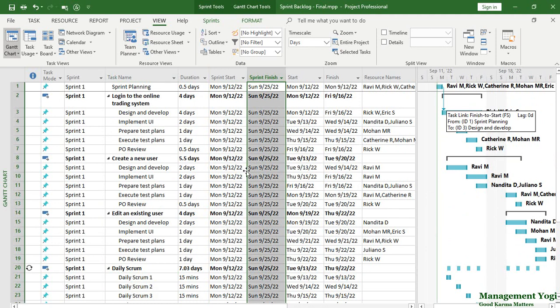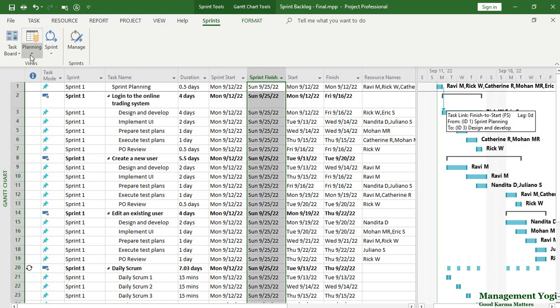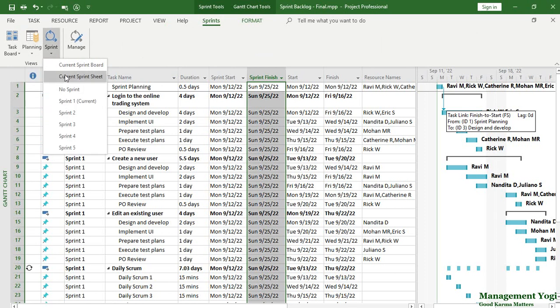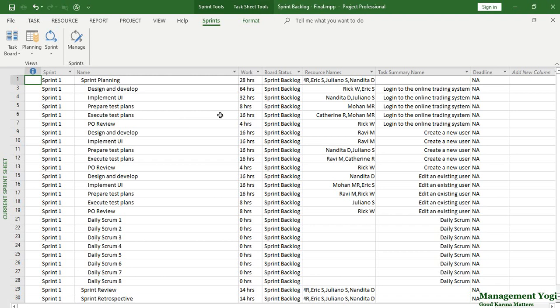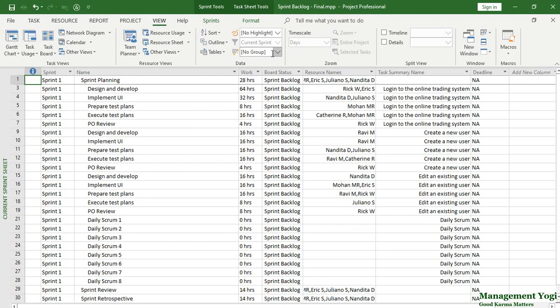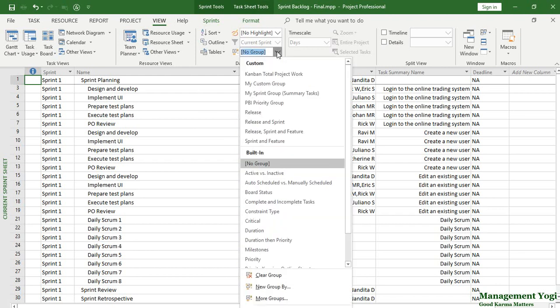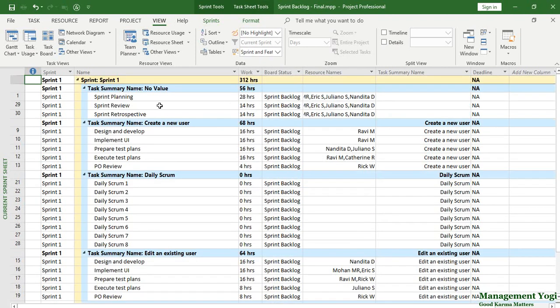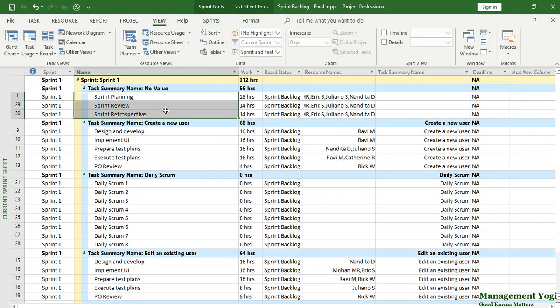The final key point: once you have prepared features, added all events, broken down features into tasks, applied resources and linking, and resolved overall allocation, you may want to see the Current Sprint Sheet view or Sprint Planning Sheet view with task summary names and subtasks properly organized. Absolutely you can. I will go to the Sprints tab, Planning, Sprint command, Current Sprint Sheet, and apply a custom grouping. Under the View tab, Data group, I will apply 'Sprint and Feature' as the custom grouping. This gives you information for the current sprint — 'No Value' in Task Summary Name means it is not a summary task, so sprint planning, sprint review, and sprint retrospective are events in Scrum.